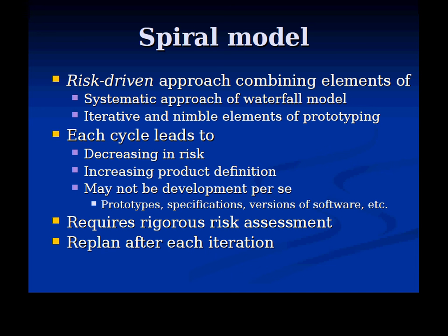I remember a team that failed to do that a couple of years ago, and I think for 2 deliverables, they thrashed around because they were trying to get a certain technology that they'd been really excited about working. And basically they came very close to not having success in their project because they were just banging their heads against a wall with this. There was another team that early on went after some key uncertainties. They did spike prototypes. They did tiny projects that were throwaway projects, but just to test out this technology. We think it should work this way. Let's give it a try, right?